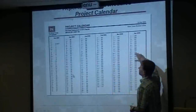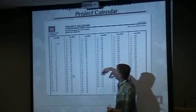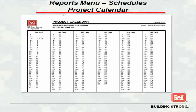This is that project calendar. It's pretty cool because if you acknowledge NTP on November 3rd, that's day zero, so you can take any day of the contract and say, okay, this is calendar day number 121 and we're at March 24th, or whatever it is. As mods come in, it will actually update. If we give you a mod, it'll update to the contract.